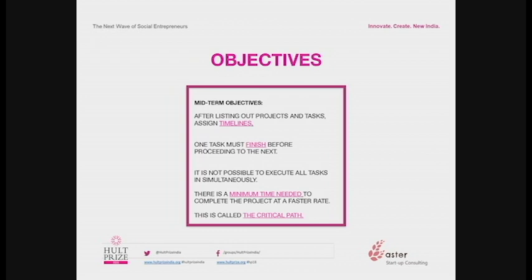But if you have to build the walls, you can build all the 4 walls together. So you can say build east wall, build west wall, build north wall, build south wall, and you can build them all in parallel. So that particular set of projects can be done in parallel. Some can be done in parallel, some has to be done in sequence. But if you look at the overall project plan, where you put all the projects together, some in sequence, some in parallel, it's useful to put it down in a diagram.